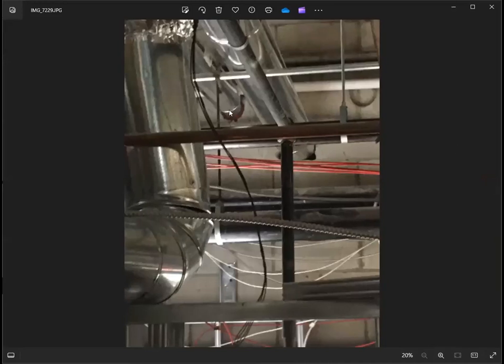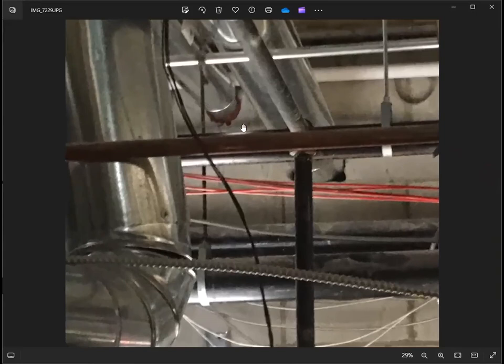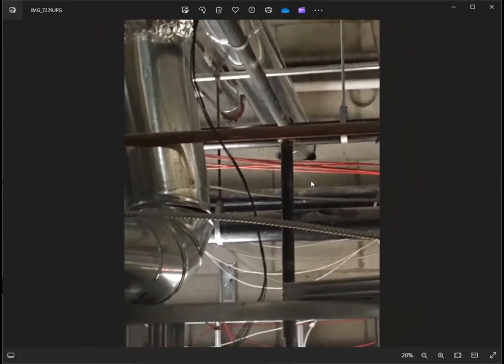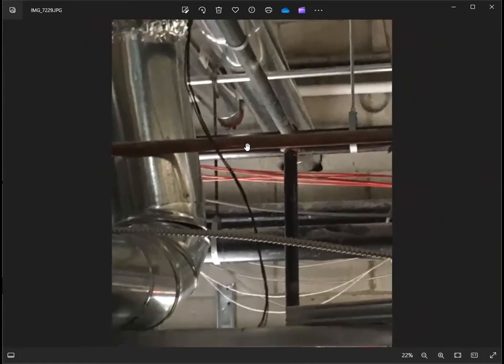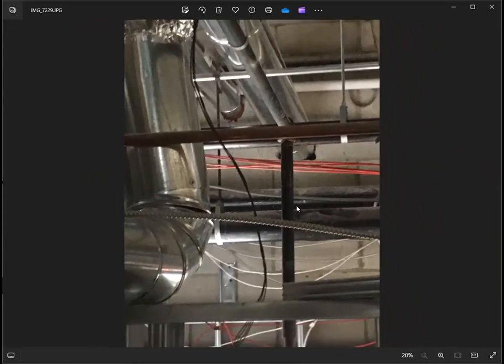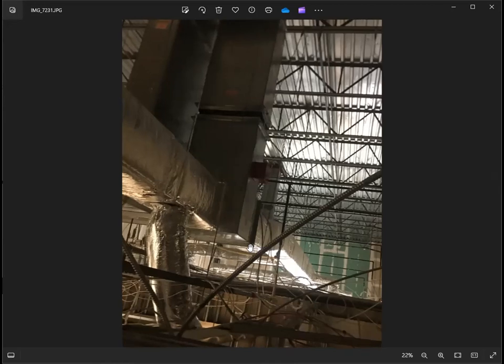And right here, this is the termination of your exhaust duct. In this case, instead of going up to the roof, they made the exhaust duct penetrate the vertical wall, going to the back of the building. So that's the change that so far I have identified on the actual installation compared to the drawing reference.